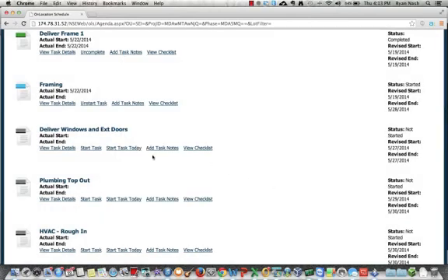So that's really all you've got to do. You need to keep in mind, if you have view checklist available, the checklist is mandatory. That means there is a checklist associated. You won't be able to complete the task until you have completed it with all items being satisfactory. That's really going to tie quality jobs to payments, so you can't fudge things through, I guess. The only way around that would be to say everything is good and step through it to be able to pay someone. So that'd be the only way you can actually pay someone.